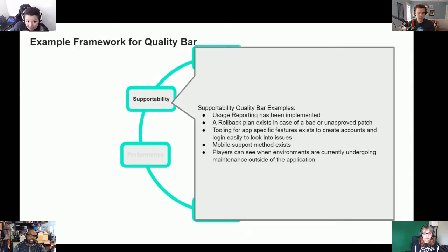Can I add one thing here too? Absolutely. For your rollback plan, you need to make sure that whoever's facilitating, commanding, as it were, the release, has the fortitude and the support from the entire leadership team to actually call the rollback, because that's a hard moment where it's one person against 10 people saying, I just need 5 more minutes, I'll do it. You've got to be willing. It's got to be a real rollback plan. In other words, if we get to this point, this person, or this group, needs to make the call. And when that call is made, here's how we're going to go forward. Yeah, it's automatic.